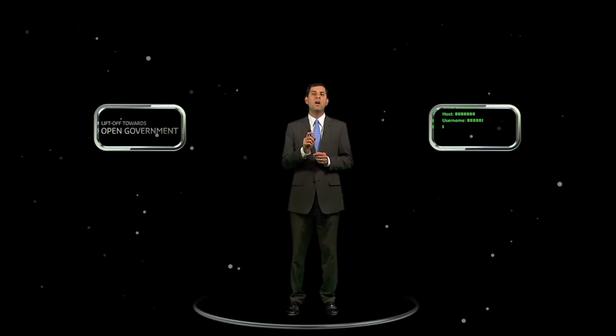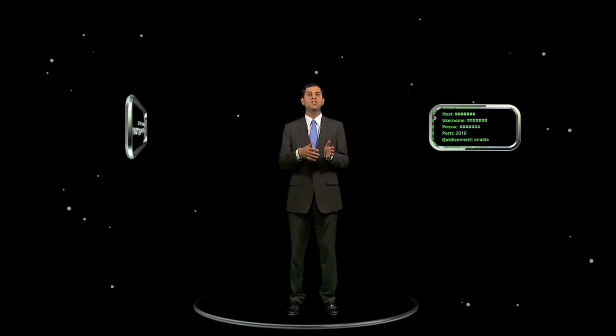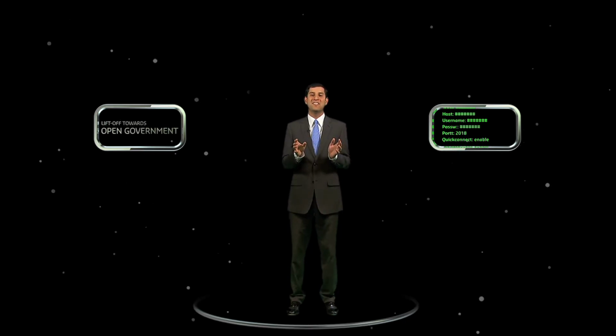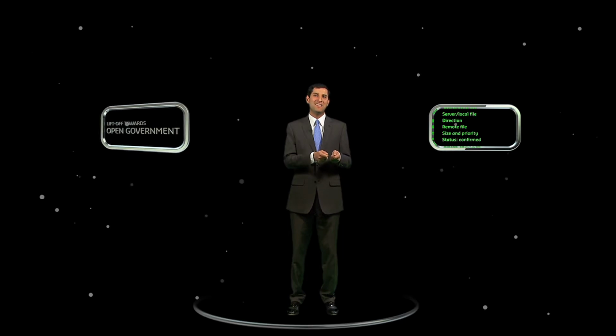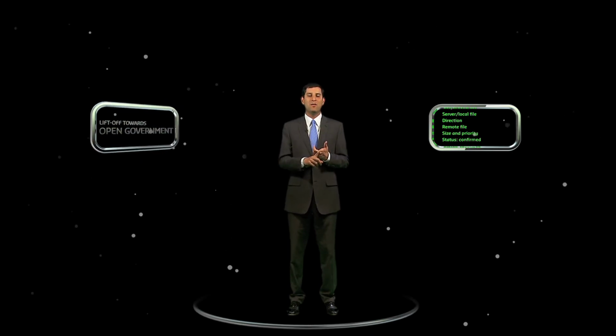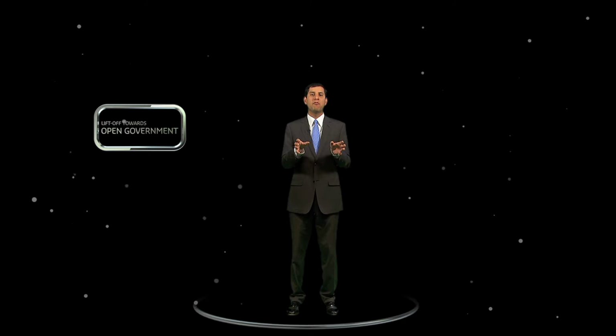When it comes to managing the $80 billion that we spend in information technology, one of the fundamental shifts we drove from day one was to make sure that we're practicing how we make those investments in an open, transparent, and very, very public way. The first thing we did is we launched the IT dashboard. I still remember my first day on the job when I got a set of PDF documents and people said, here are $27 billion out of an $80 billion budget that are way over budget and years behind schedule. For example, there was an IT project that was 12 years behind schedule and $1 billion had already been spent. I immediately decided to launch this IT dashboard to shine light on the performance of this portfolio.